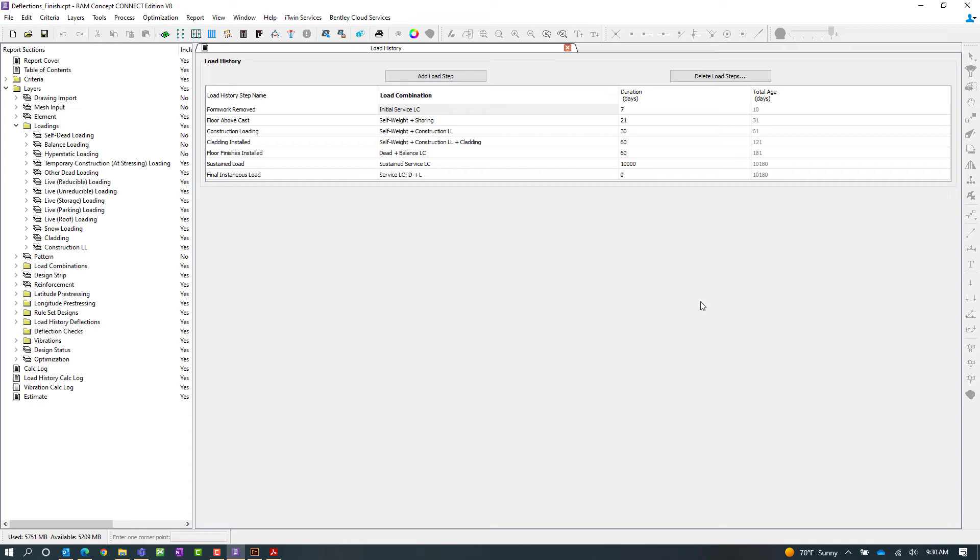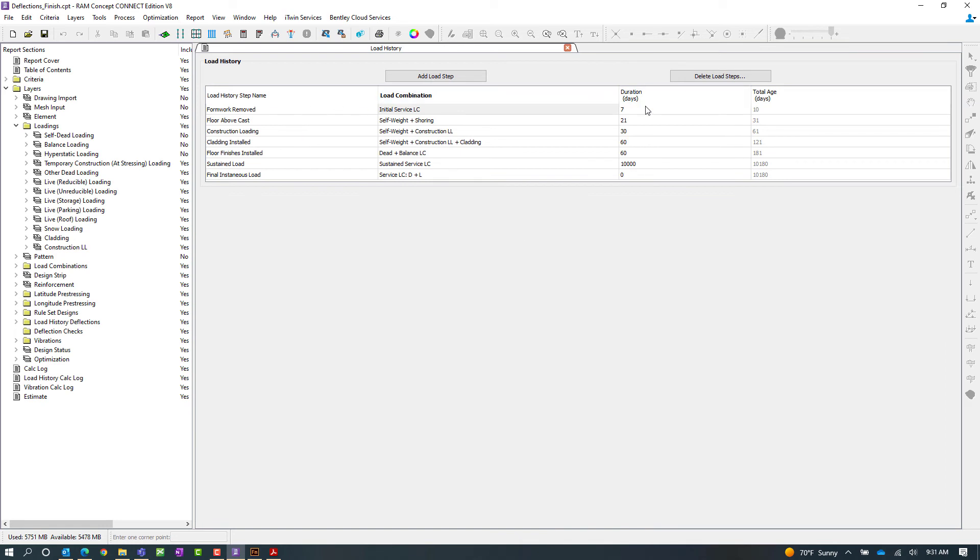So I've already gone ahead and considered all those different stages within my construction sequence for this particular model. I've already gone ahead and referenced in their load combinations and considered when the duration will be. Now the duration will be specific to days after pour. So for example when my formwork is removed I'm assuming that's going to be seven days after the concrete slab is poured so I put seven days into this field.